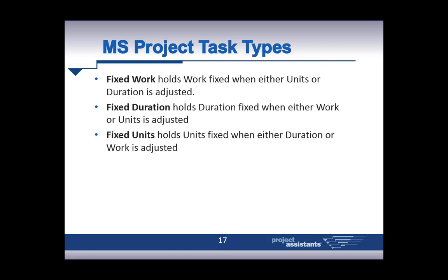It's important to remember which one you're using, because the project scheduling tool will respond based on the task type that you select, and the results can be very different. So if you're in the tool sometime making changes and you don't understand why, it's usually because you don't have a good enough understanding of the task type that's been selected and how the scheduling engine works behind that task type.